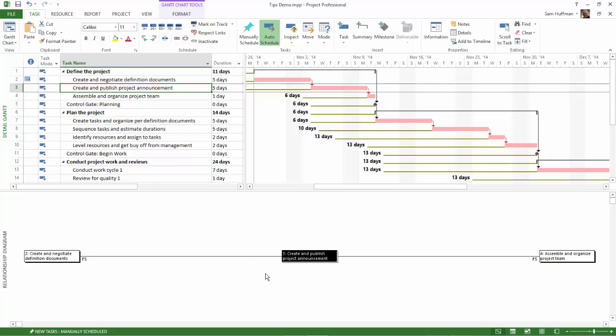Now, the selected task is in the center. Immediate predecessor is to the left. Immediate successor is to the right.